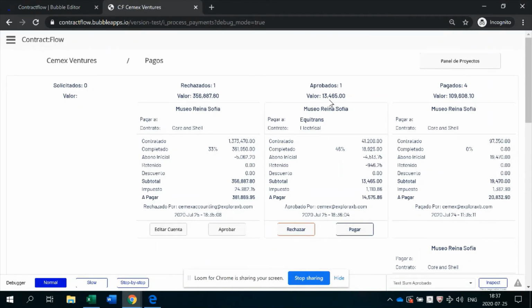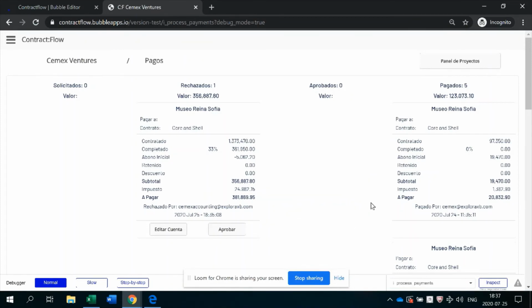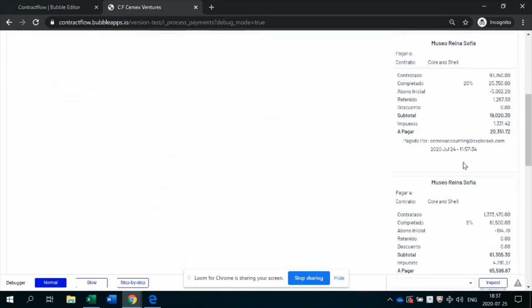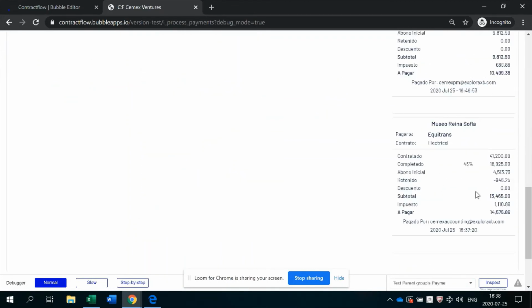So it's a business rule that can be easily determined inside the company, where it's just, hey, don't say in this system that something is paid if you don't have the invoice for that payment. So until we have the invoice, we don't say that something is paid. The person from accounting can make the check, do whatever they have to do to get that invoice, and once they get that invoice, they come back here and they can say that they paid for that. That goes into the paid column. Should have gone to the bottom. Yeah, it went to the paid column, it went to the end.